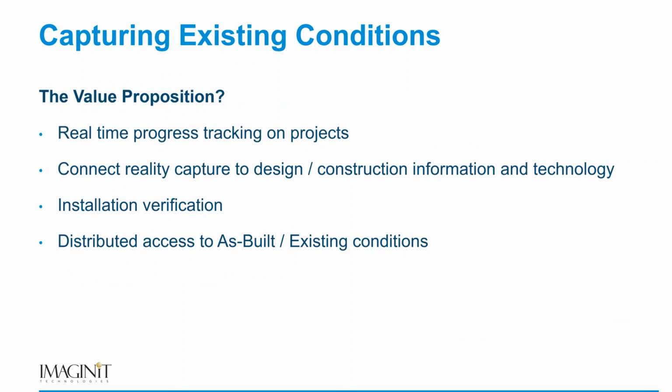A couple things, and then I will hand it off. So, what can we get out of this type of scan data? Well, if you have the tools in your tool belt, you can do progress scans and understand that things are coming along as I see fit. I'm able to take that data and ensure that what was designed and what we're being told is being done, you've captured it at that moment in time.